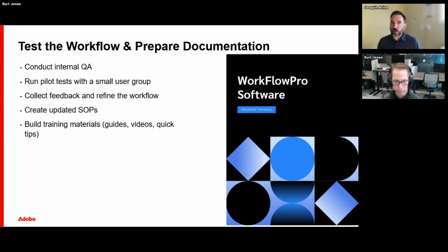And then along with that, from what we learn, can help us build our training materials or even think about training when we're doing the UAT testing. And I do suggest regular check-ins with the UAT process. So if you do 4 weeks of UAT, if you do 2 weeks of UAT, it doesn't matter. Just at some point, have a check-in, usually at the halfway mark if it's a little bit slower, or weekly if you spread it out over a longer period of time, so that you can change and alter everything as it comes up. So next slide, please.